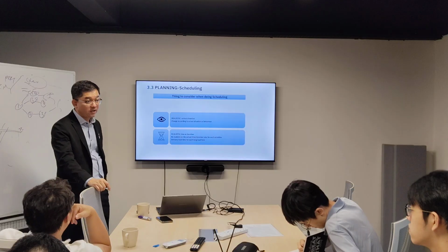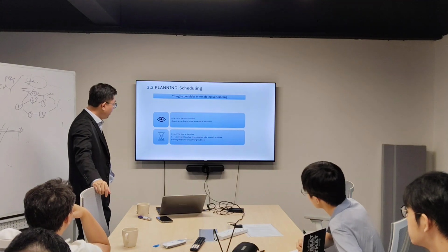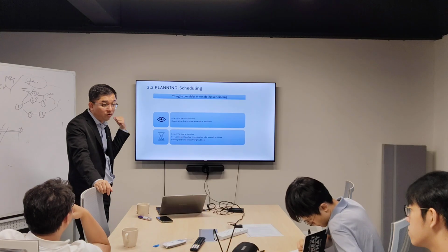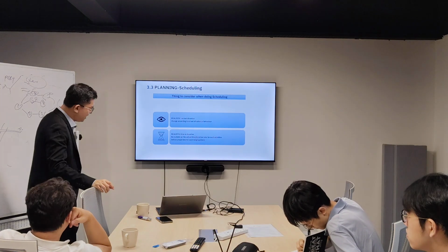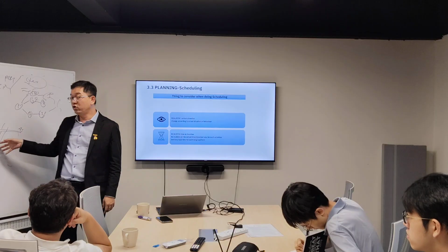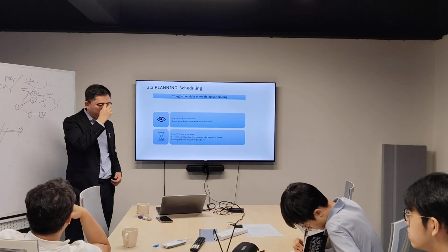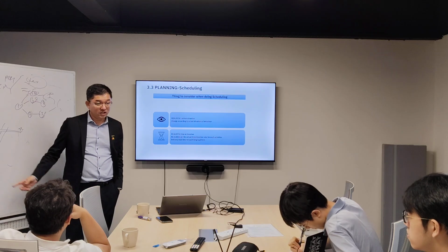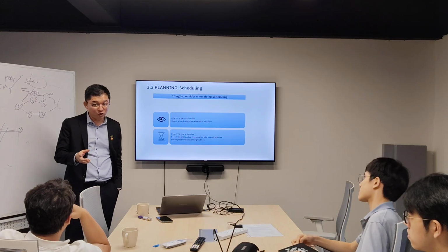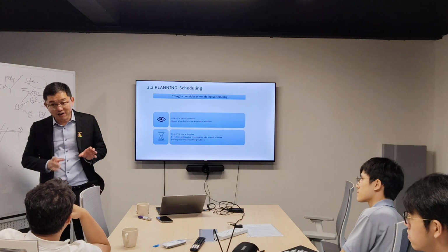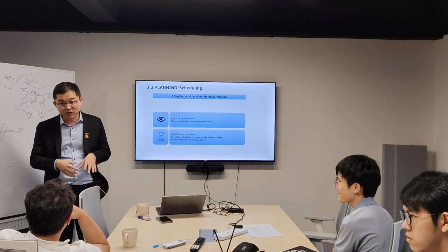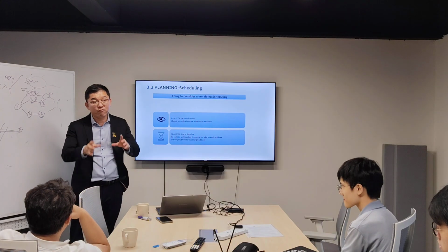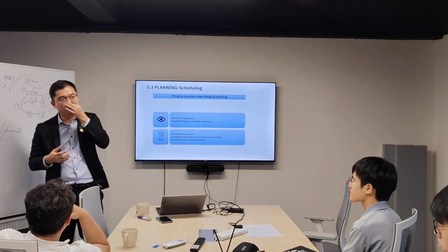The actual situation, and also the realistic time of duration. When we do this, especially, for example, when we do an excavation, we know that this is a rainy season. Do you think that you dare to say I can complete the excavation within 5 days? You need to consider the rain for that month.